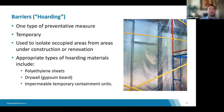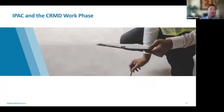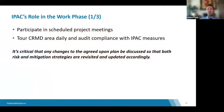The next section covers the work phase of CRMD. The work phase poses the most critical exposure risk to building occupants, including staff and residents, as it involves both demolition and construction. This space can potentially generate significant dust and lead to stagnant water. Demolition could also reveal existing hidden issues behind walls, such as mold, which not only poses challenges but is also an example of where work can balloon into something much larger.